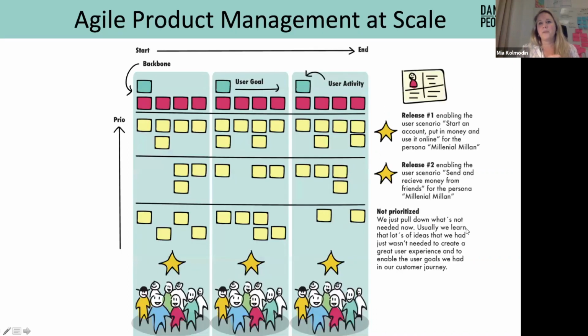And at the product management scale, using this user story mapping technique, setting release, having teams taking ownership, and maybe working mostly within one area of that backlog, and maybe adding stuff into the backlog and adding things into parts where other teams need to help them. This could be your shared backlog then for many teams.